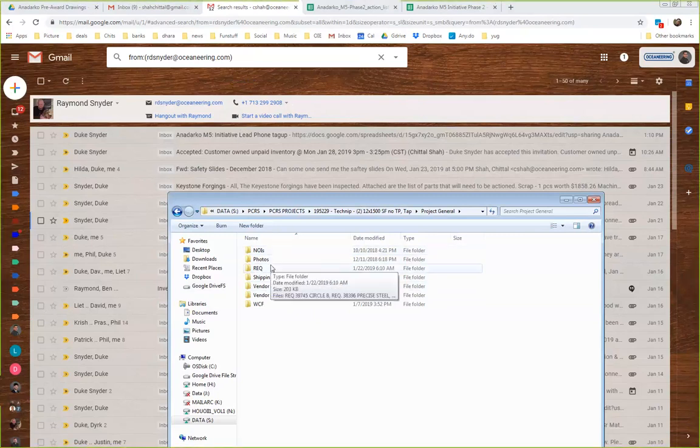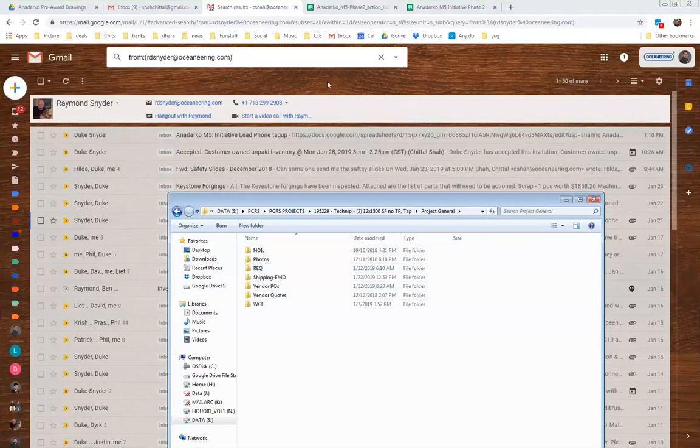So they use this. Your question. So my question is, does the PC tab, by phase, which items need to be ordered? Some items have a longer lead time to be delivered, so I would assume those would be some of the first items that need to be ordered. So we go by, let's get whatever we can ordered. But we also know which are long lead.